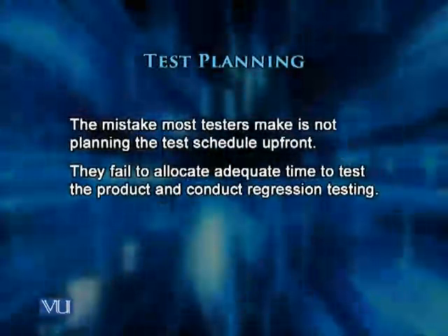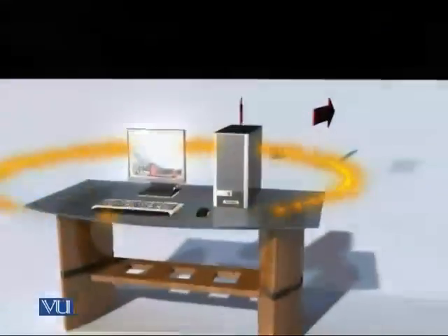They fail to allocate adequate time to test the product and conduct regression testing. Whenever you are performing software testing and making changes in the code because you have discovered certain defects or bugs, once these defects or bugs are fixed, regression testing must be conducted in order to ensure that whatever was already working still continues to work.